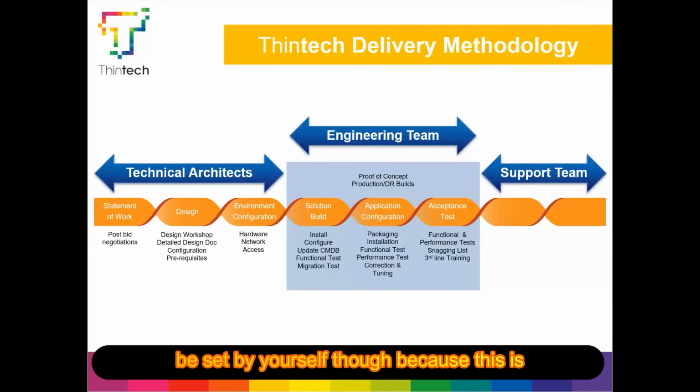So, because this is just a scaling issue for us. If you say to us, I need this delivered in 3 months, for example, but when we scope it all out, it works out to be 6 months work, then that's fine, because we could just allocate more engineers. So if you have specific timelines to particular projects, again, that would be a responsibility that we will put back to yourselves.